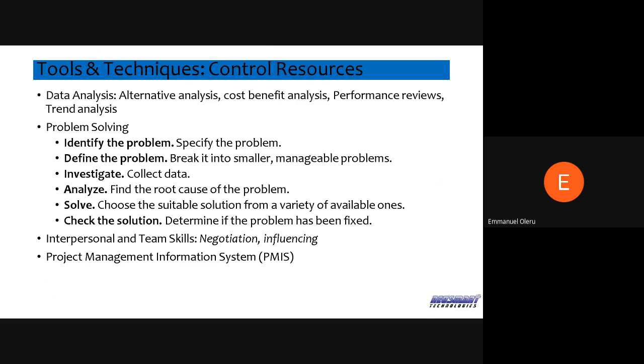So the problem is that we want to build a mobile application. Okay, break it down into manageable problems. We need a product manager. We need the development team. We need money to host our services online and all that. Then you investigate and collect data. Where is this coming from? Is it coming from the money for this, money for that? Go down to analyzing it so you can find the root cause. When you have found the root cause, you solve the problem and then check the solution to be sure that you're good to go.